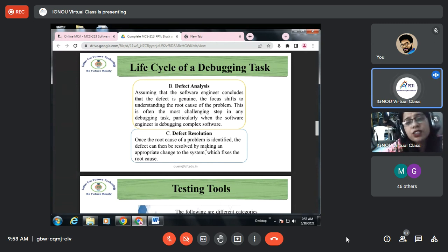So being the project manager of your team, we have to take on this responsibility and assign the name of a person against each defect. If there is a big list, then you can include two or three people. If there is a small list, then a single person must be appointed, because adding more people to a small task will create chaos, or we can say a communication gap also. So here comes your leadership style also.